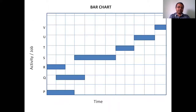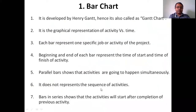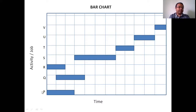From the bar chart you can observe that P and R activities are starting simultaneously, but you can't predict the sequence of the activities. You can't predict whether we have to go for P activity first or R activity first. We don't know the dependency — whether the P activity is dependent on the R activity.